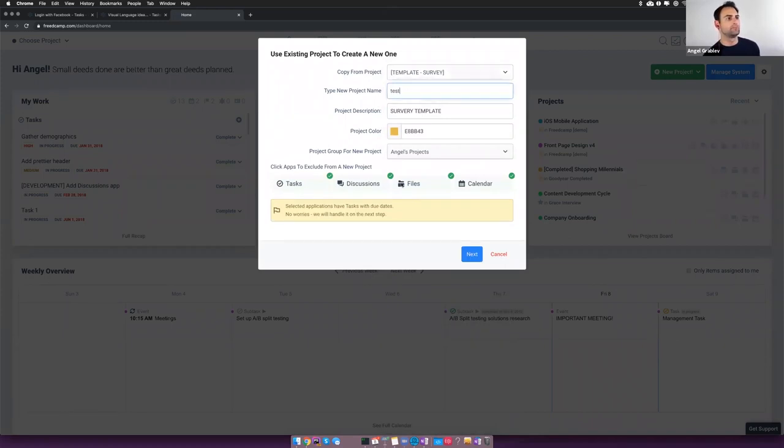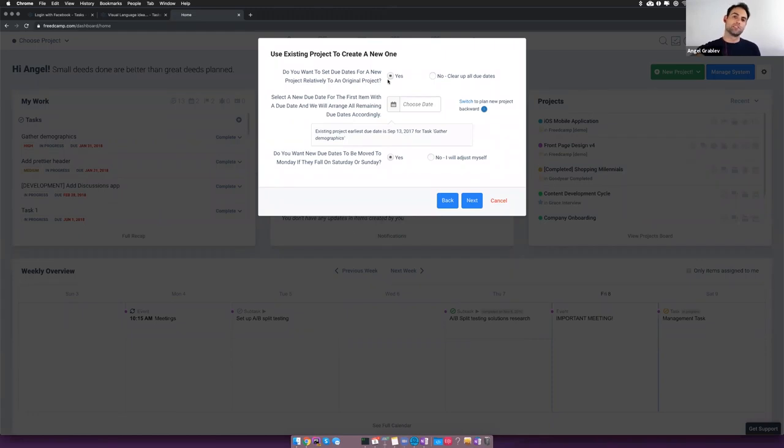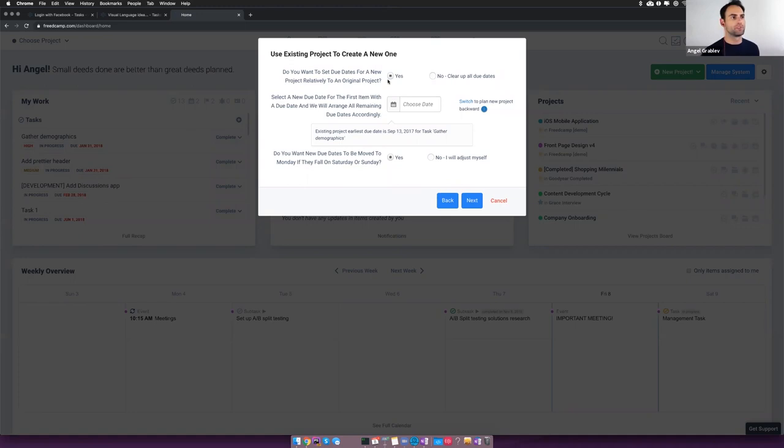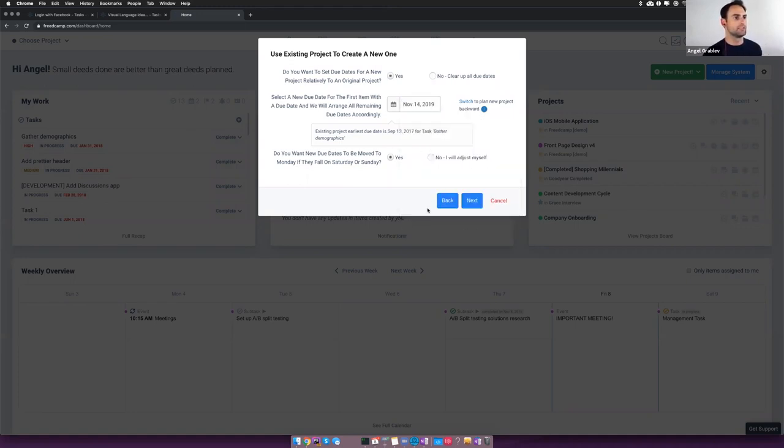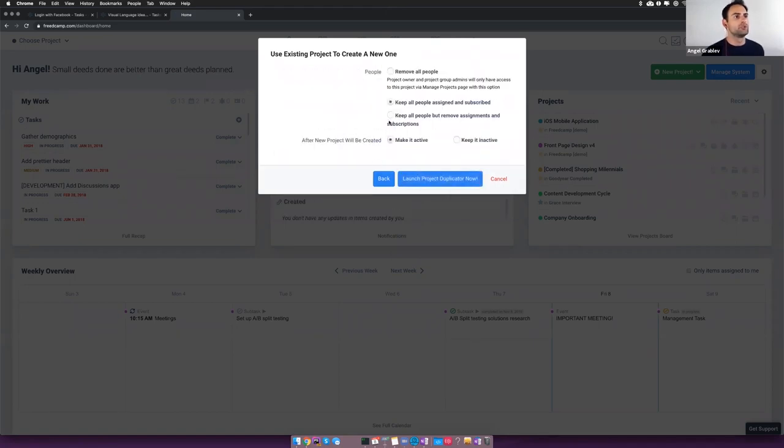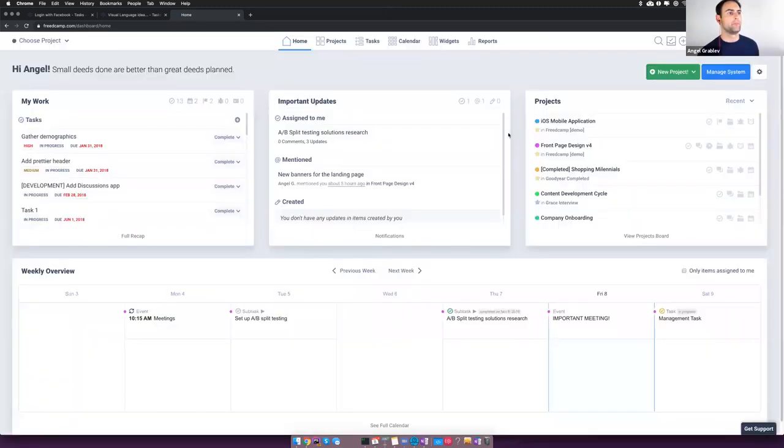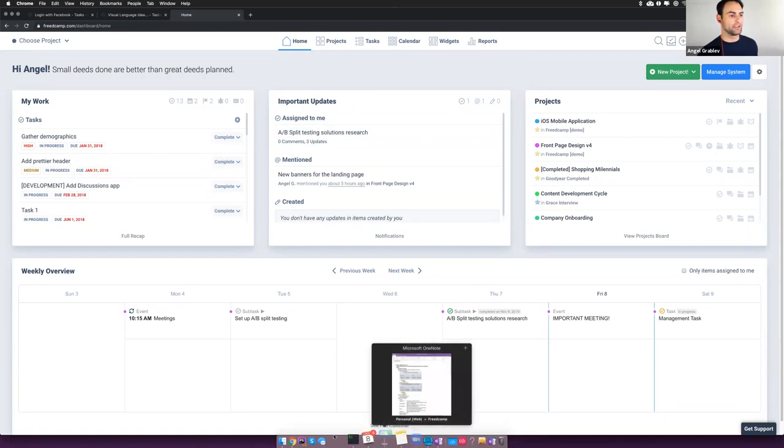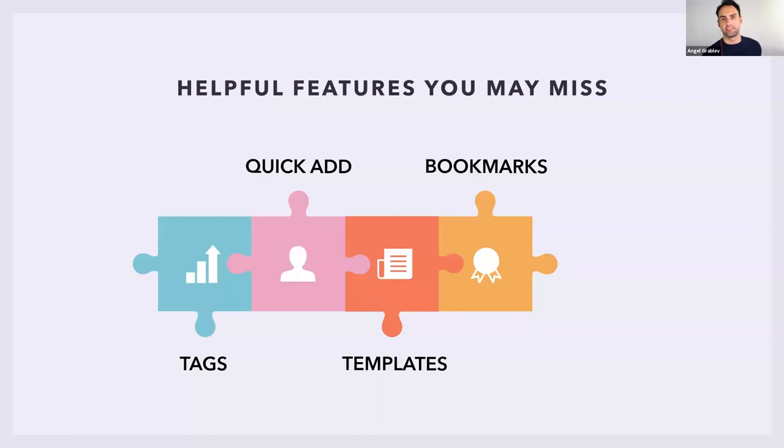I use it as my template every time I'm creating a survey project. We can type in a new name here. Choose which applications to import. Choose if you want to set the due dates to get cleared or to get started from a new starting date. You can even reverse it so that it starts from an end date. If your project is based on some deadline you have to deliver, you can schedule everything back from that due date. Or if your project has to start on a specific date and then two-week chunks for every sprint, you can go from the starting point. We can choose to keep people subscribed and assigned to notifications, remove people. Pretty much everything's covered here.